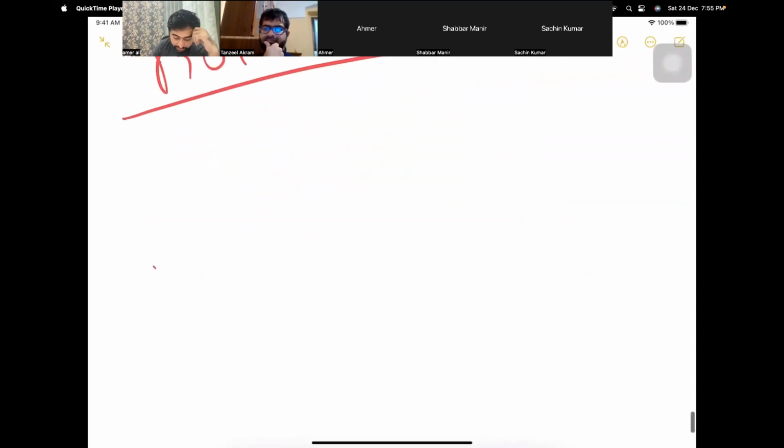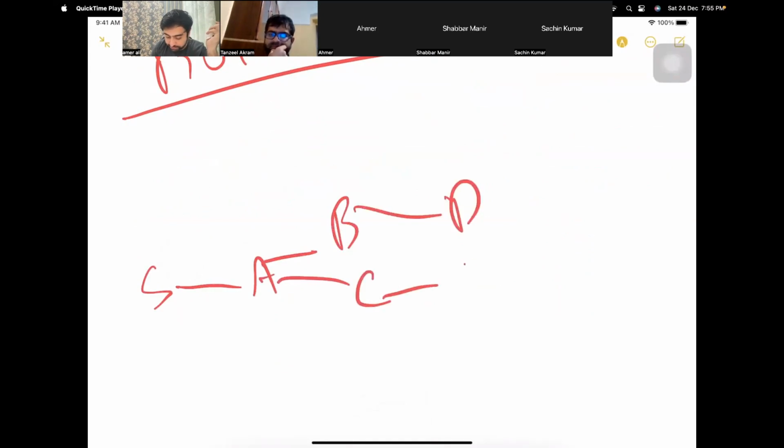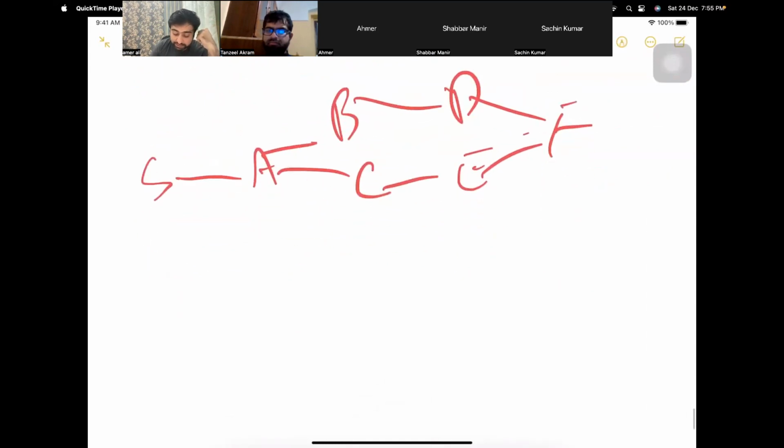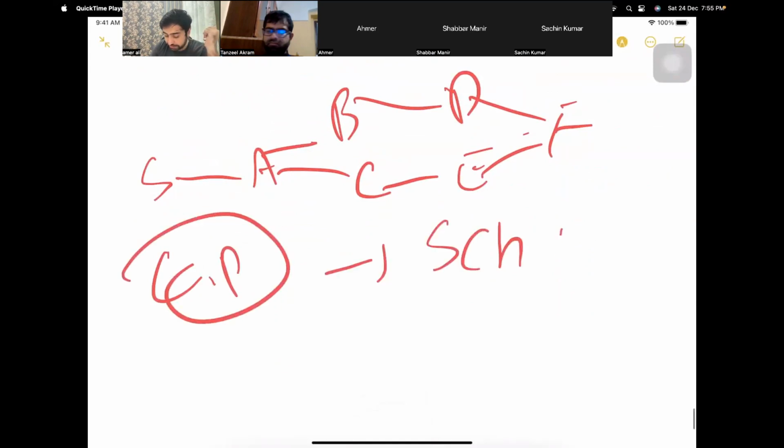We calculate the entire thing in a way. We sequence the activities using the precedence diagramming method. We sequence them, calculate the duration, and put the duration of each activity. We use the critical path method to calculate which one is the longest path. That path is called the critical path. Your critical path is your schedule baseline.